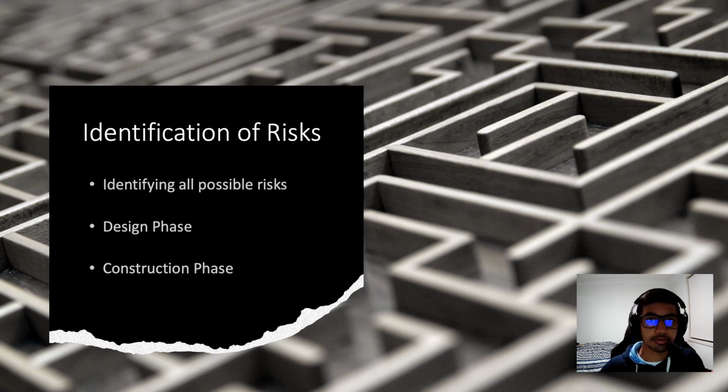Risks that weren't identified before the start of the project were later identified during the project. For example, concerns related to the exhaust fumes from the tunnel were originally proposed to vent through the portal at the eastern end, but this was later changed to add a separate ventilation shaft to manage this risk better. This example shows how risk was still able to be identified during the progression of the project.